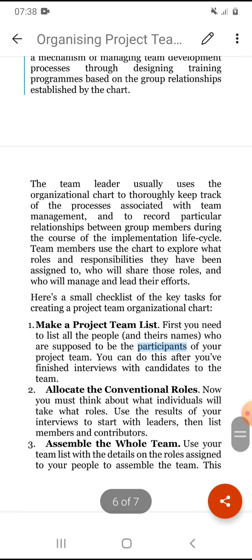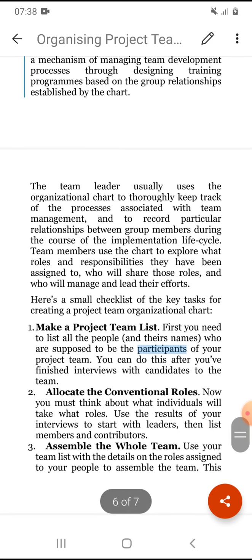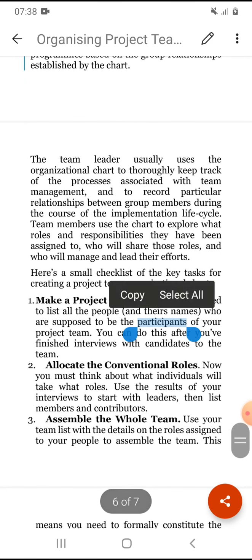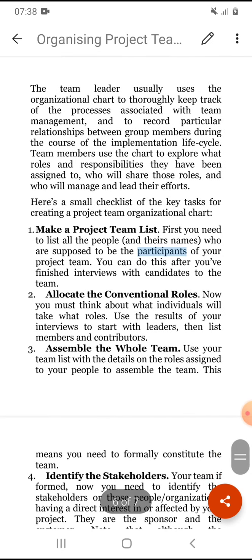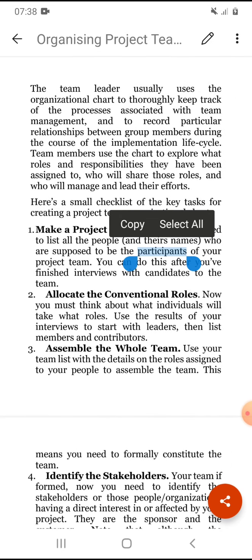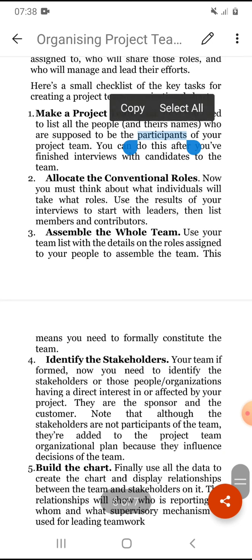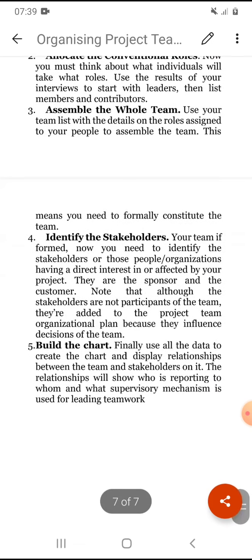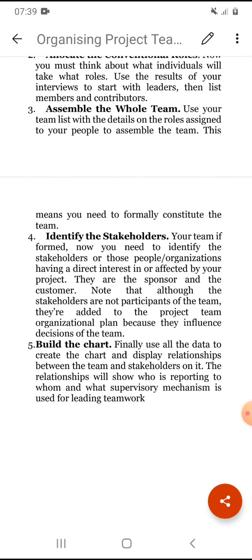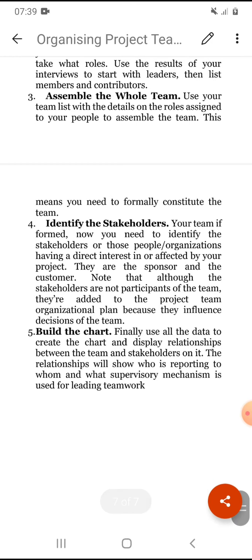Here is a checklist of key tasks for creating a project team organization: make a project team list, allocate conventional roles such as leader or member, assemble the whole team, identify the stakeholders — those who are affected by or affect the project — and build an organizational chart showing who will do what tasks and their contributions. That's all for organizing the project team. Thank you.